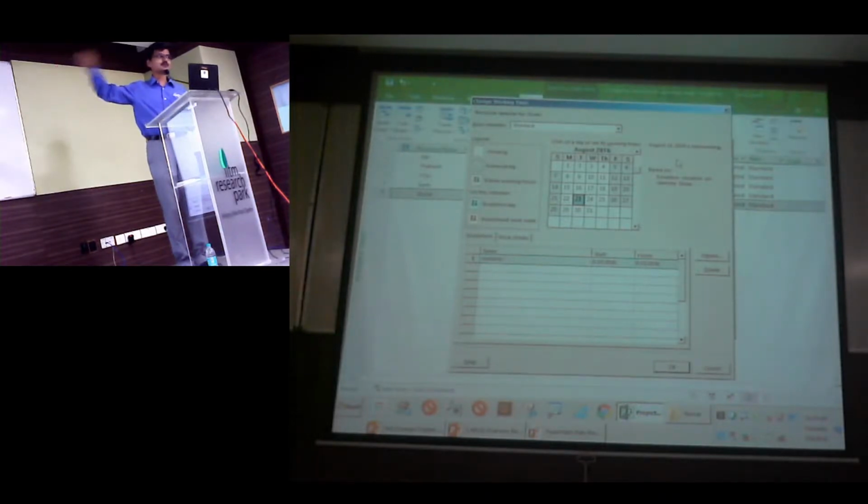So most of the problem happens because the calendars are not set right. Okay, you see that if we do a mental calculation, it should take 10 days, but you see project completes it in 15 days or 5 days. We try to do all these things and finally we change it to manually scheduled so that we have complete control over how to change this. But that will not help. So get your calendars right. That's what I'm trying to tell you.